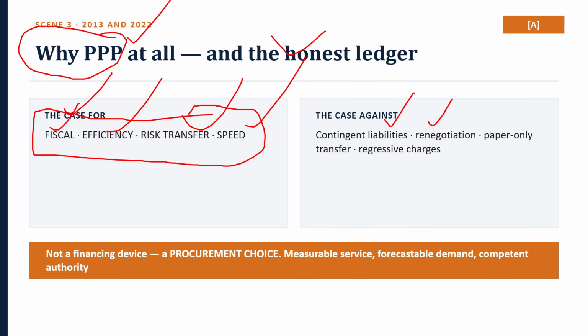The single sharpest criticism, and the one the survey itself concedes, is that at state and municipal level, PPPs are still confused with EPC contracts, a partnership treated as a vendor arrangement, and are perceived as selling of assets rather than long-term service partnerships. The survey notes this wrong signaling creates two problems. It sours public opinion and it drives away the investors willing to hold risk across a 30 to 60 year concession.